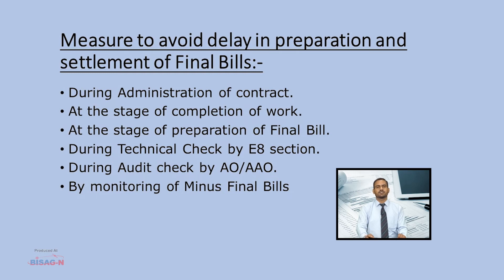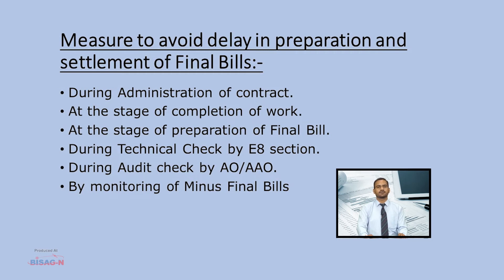The engineer in charge shall ensure that immediately after completion of work, the items of work still left to be measured — including deviations — are jointly measured with the contractor, with MB recorded at the stage of completion certificate. Within 24 hours of completion of work, the contractor shall report this fact to GE. The completion certificate shall be issued by GE in no case later than seven days after completion.